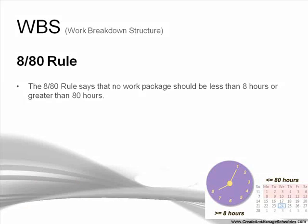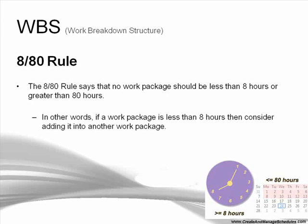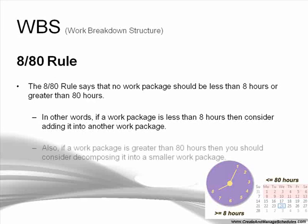The 8/80 rule states that no work package should be less than 8 hours or greater than 80 hours. If a work package is less than 8 hours, consider adding it into another work package. If a work package is greater than 80 hours, you should consider decomposing it into a smaller work package.